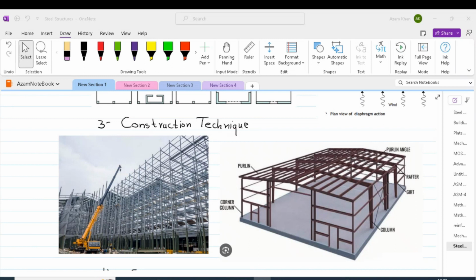In the case of top-down construction, certain activities at higher levels of the building are initiated and carried out concurrently with the activities at lower levels. The approach of top-down construction is often used to expedite the construction process and is useful for projects where early completion or specific sequencing is critical.